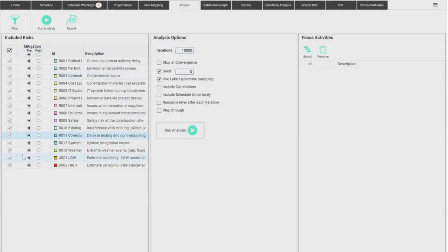If you want, you can also measure impact of things or test ideas by simply turning off a given risk. You can turn off 1 or 2 risks, simply unflag the risk, and when you run your analysis, you will see the whole thing without that risk. It's a very quick way to test ideas, even if you don't know what the mitigation is. But if there is a mitigation that you could put in place, you can easily calculate the impact of going after that.